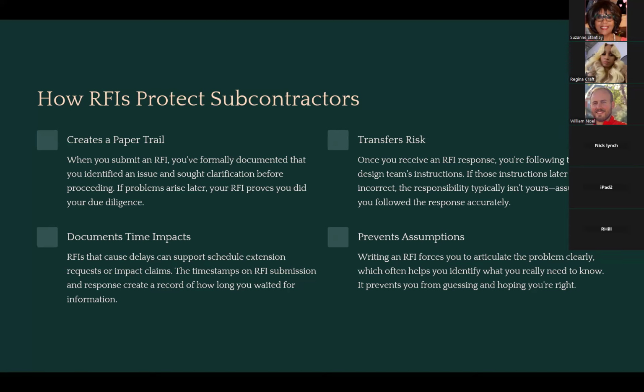That protects you. It also protects the general contractor, because most of the time, if it's delaying you, it's delaying them. And if it is an issue with the contract documents, then that's something that they shouldn't be responsible for either. They're going to want to go get money from the owner for that. And if you didn't provide them that information in a timely fashion, they can't go get it, which means you're not going to get it, and it's bad for everybody.